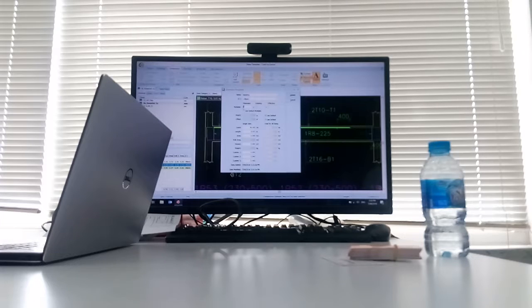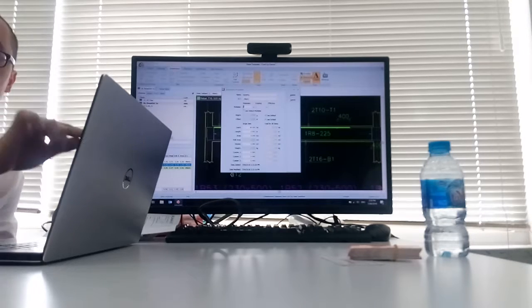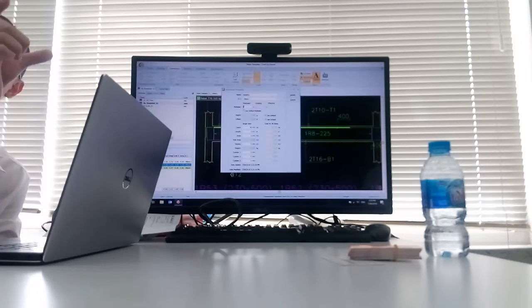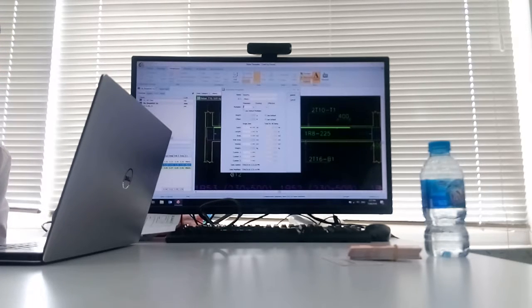Therefore, the length is totally about 60 meters. They have a lot of laps. Yes, how many laps do I have in this here? I have a put top, and from the front, you pull till the end. Then because that one you will just measure without any lapping, you will do this lapping separately to add in the extra length. So if we know that the standard bar length is 12 meters, we know that there'll be a lap minimum every 12 meters, and we have to set the.